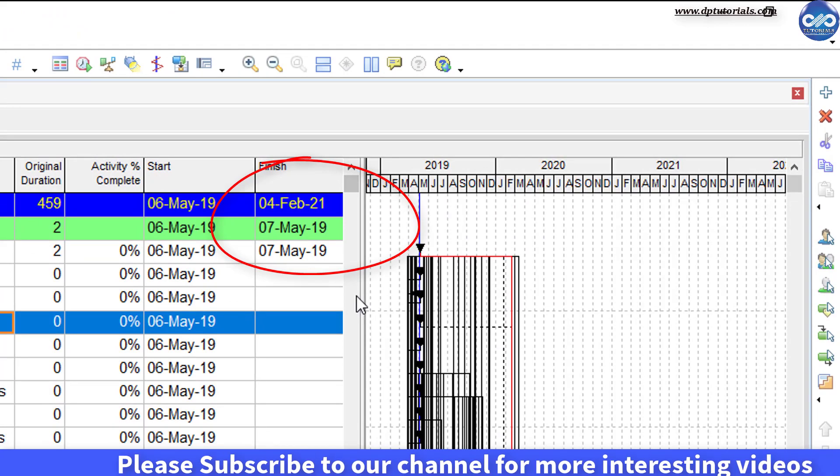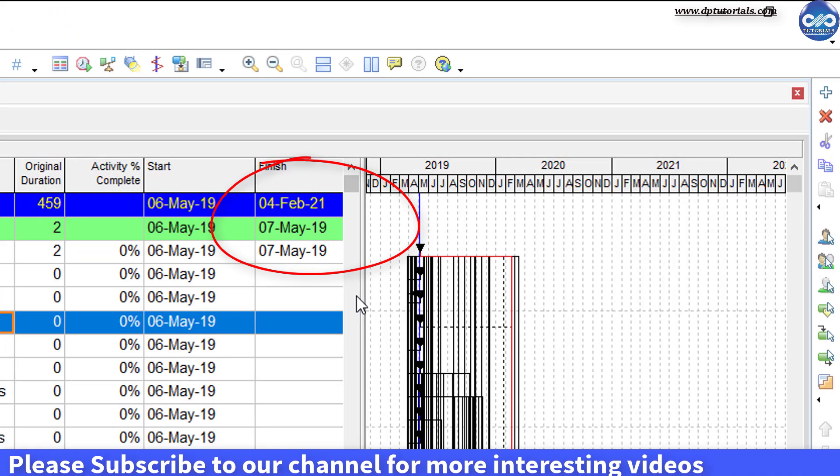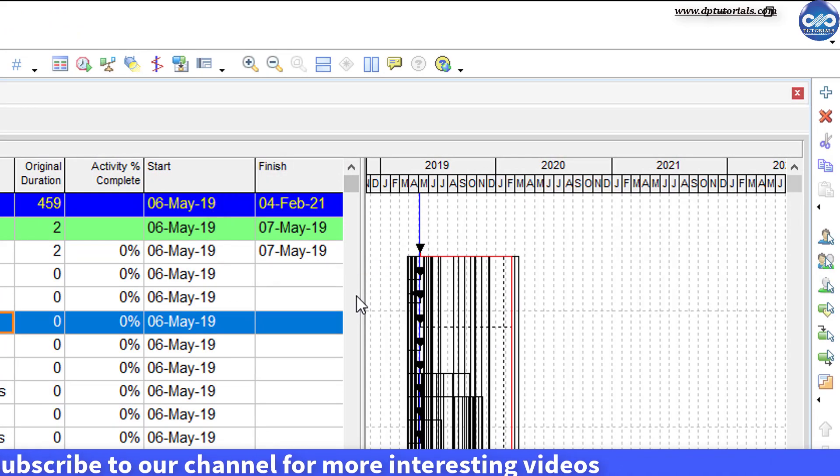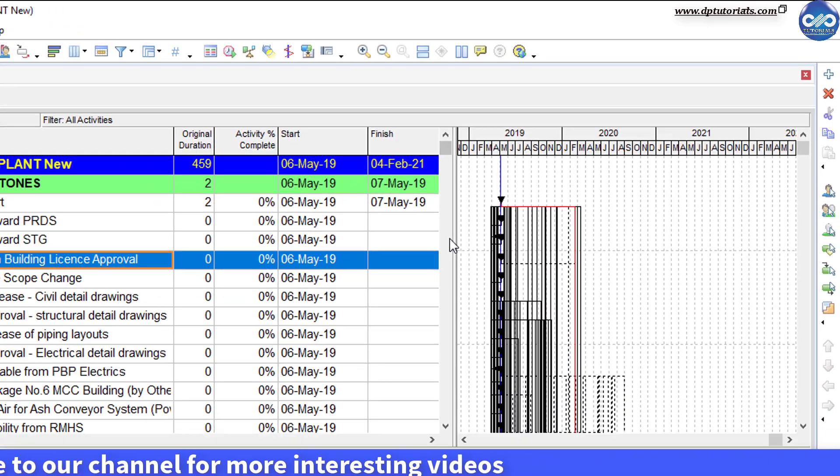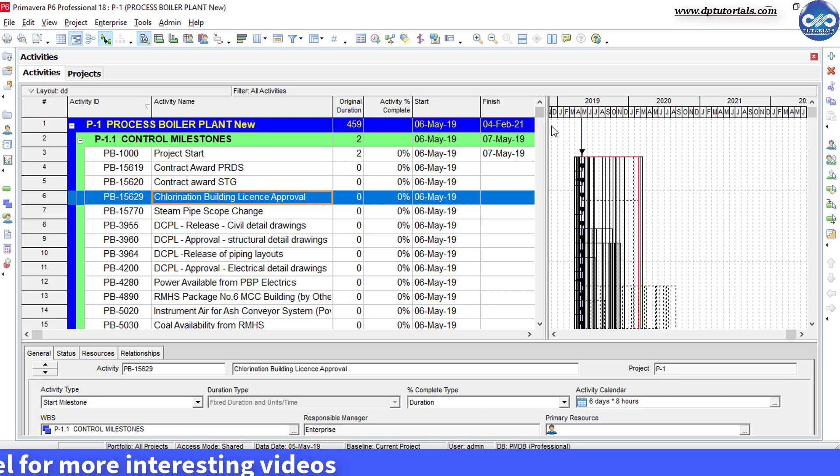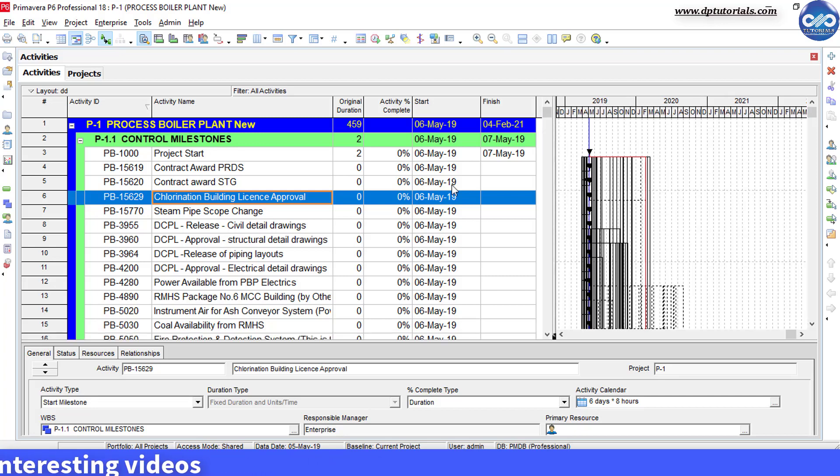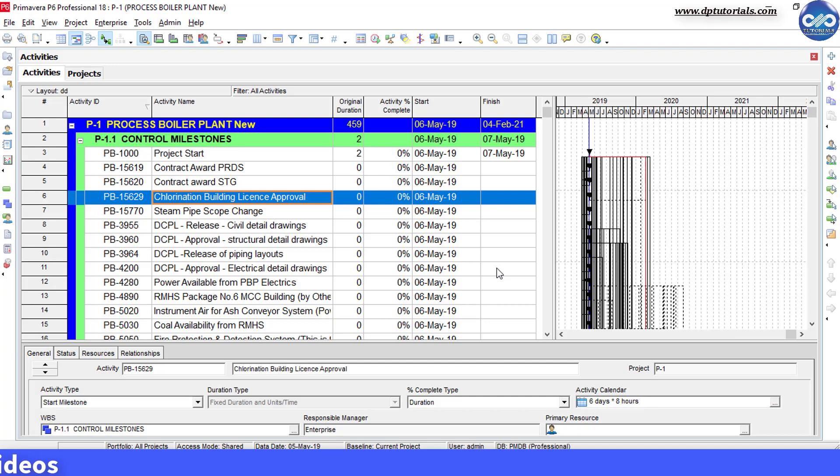But friends, before performing this trick, take all the necessary steps of taking the backup, checking the log files in case of any errors, as this is just a trick and not the recommended standard way of crashing the schedule. Always perform this trick when you lack time.